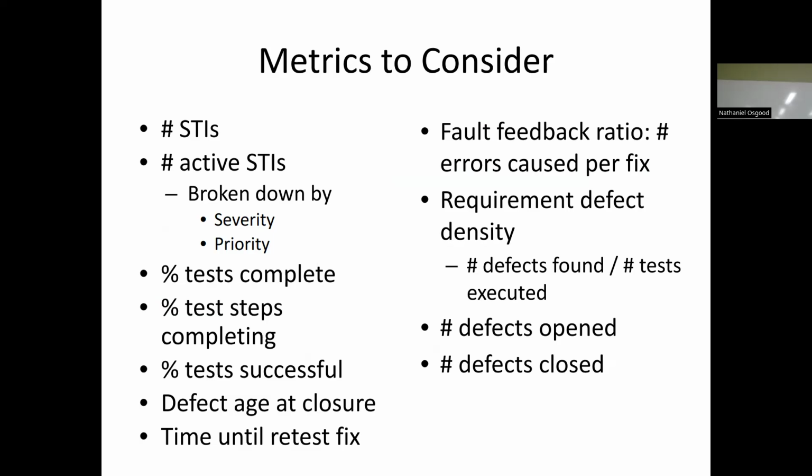The priority is urgency in fixing is one way we sometimes view it. Another thing is we consider the probability of its occurrence and the severity, and we consider both of those. And so something may be high severity, but low priority because it's so rare. Can you give me something that's low severity, but it's going to be very high priority if you're a stakeholder?